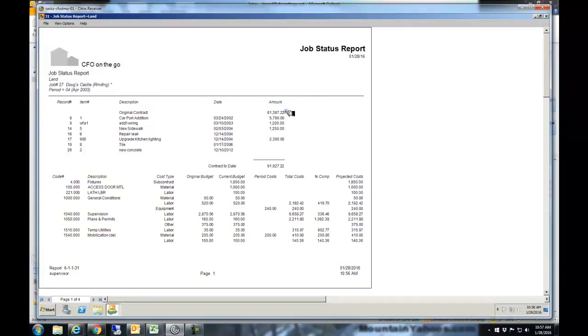And so at the top here, I have my contract value. Then I've had 4 change orders that the owners actually signed and approved, sent back. So I now have this contract value of $92,000. These are my items of work down here, and what type it is, what my budget was, what the budget now is for each of those line items with the new change orders, what I spent for the month, and what I spent to date. And this is simple but effective.